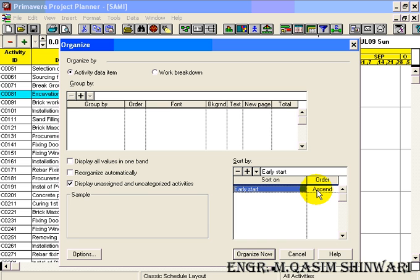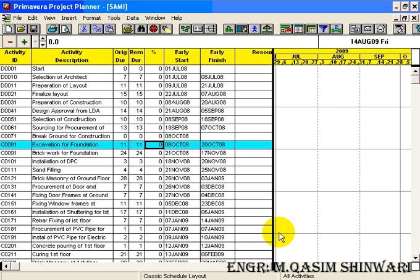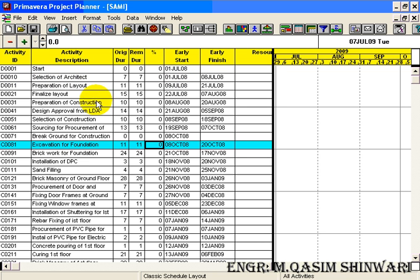So that the first activity to be done will be on top and so on. Click on Organize Now. You can see that it has sorted according to its early start date. D001 starts, selection of architect, and so on. So in this way you can do sorting.